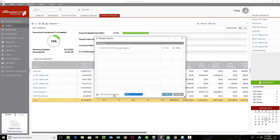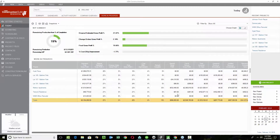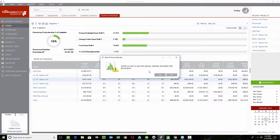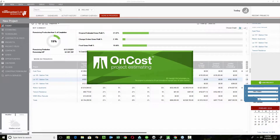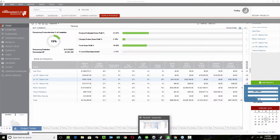The engine that drives the WIP report is all going to be estimating and QuickBooks integration. From the WIP report, if you need to get into an estimate, just click on the name of the job and it will give you an option to open up the primary estimate for that job. The WIP report itself populates entirely from the primary estimate on any job. If you have several estimates on every job, there's always going to be a preliminary estimate, and then the negotiated contract, and then the living document as adjustments are made.